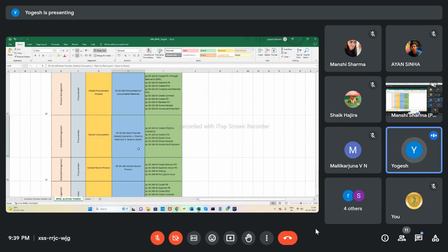Issue from the stationary tanker. In this process, I already mentioned the stationary tanker and its capacity. So how they replenish the diesel from that stationary tanker to their storage location. So diesel stock will be issued from the stationary tanker to local tankers, and then finally issued to the vehicles, trucks, equipment and whatever the project has. So this process will be managed by the central clerk,